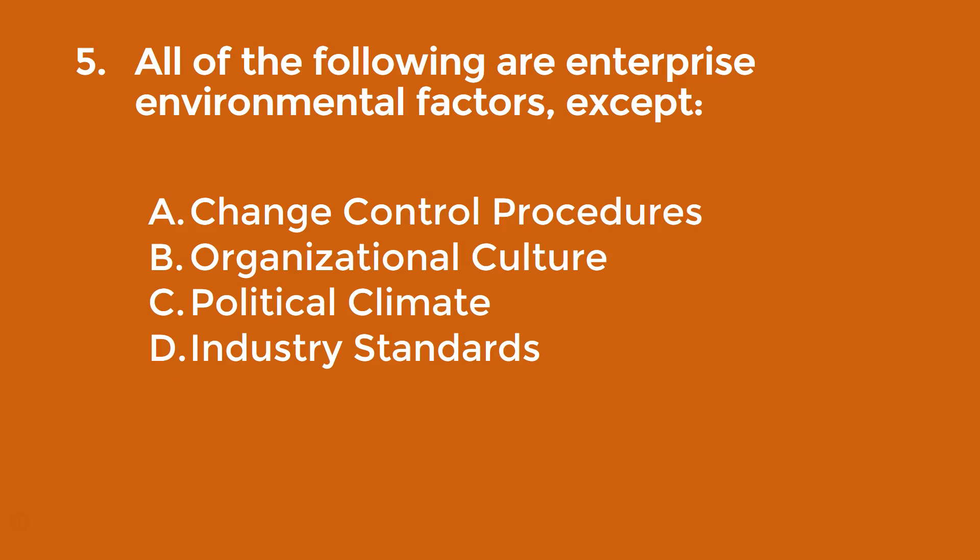All of the following are enterprise environmental factors, except what? The correct answer is change control procedures. Those are actually an organizational process asset, which are often policies, procedures, or knowledge bases specific to an organization. Enterprise environmental factors are conditions outside the control of the project team that could affect the project, such as culture or political climate.